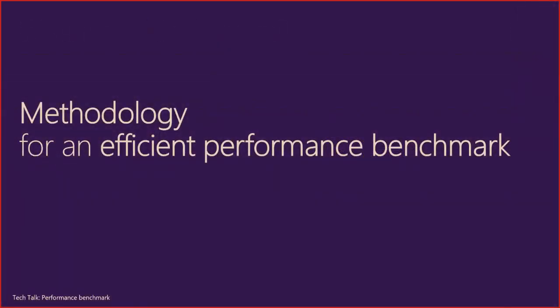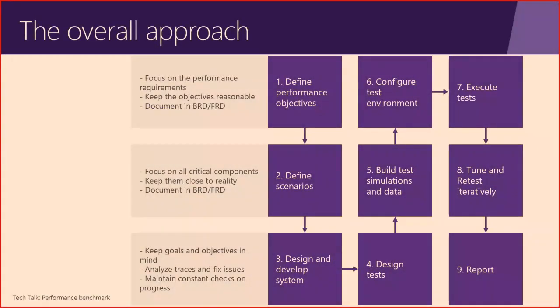For the methodology, it's very important to really think about how to approach the benchmark. We see sometimes in the projects we work with that the project manager will just ask a technical lead to do a performance benchmark, and he will directly start on scenarios that he thinks are relevant, and he will start fine-tuning with no specific target, leading to, in the end, no result whatsoever. So having an approach that is focused on what the business considers critical is very, very important.